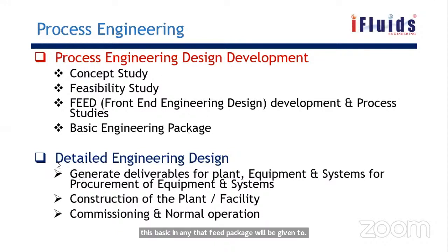For detail engineering, there are many companies like Bechtel, Petrofac. We call them EPC companies, engineering, procurement, and construction, where they do complete work from the FEED data till the commissioning and operation of the plant. Detail engineering is a major part of the work, where most of the chemical engineers, many chemical engineers, will be working.